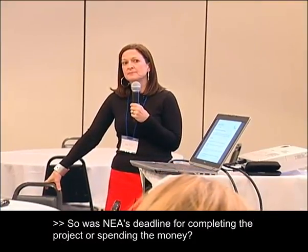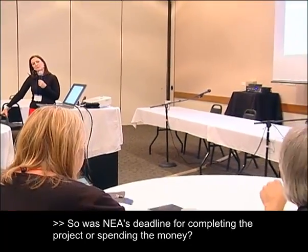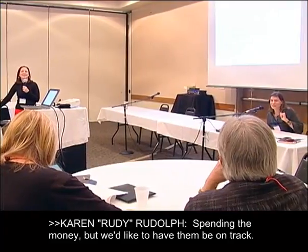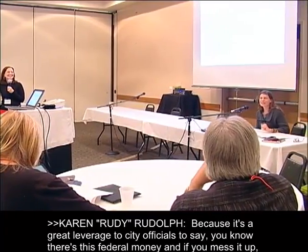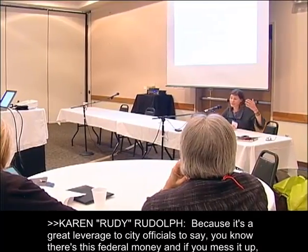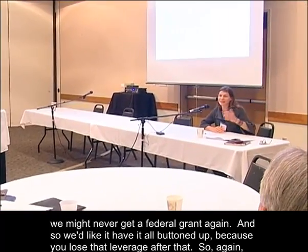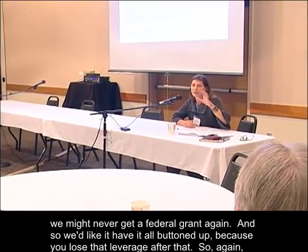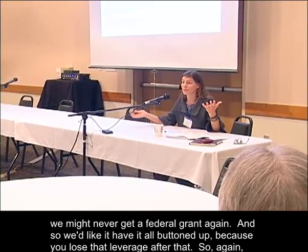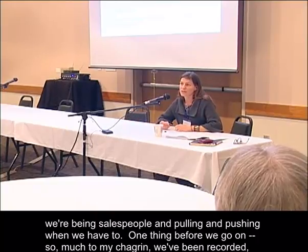Was the NEA's deadline for completing the project or spending the money? Spending the money. But we'd like to have the project on track, because it's great leverage with city officials to say there's this federal money, and if you mess it up, we might never get a federal grant again. We'd like to have it all buttoned up because you lose that leverage after that. So again, we're being salespeople, pulling and pushing when we have to.